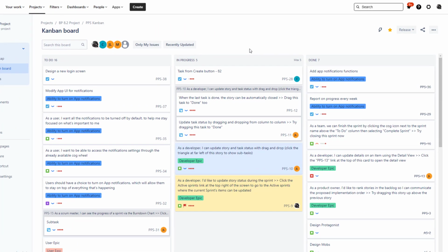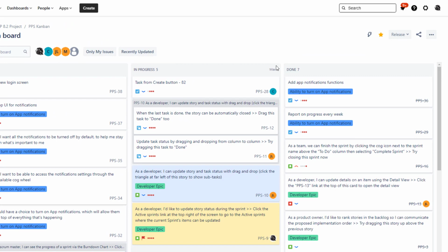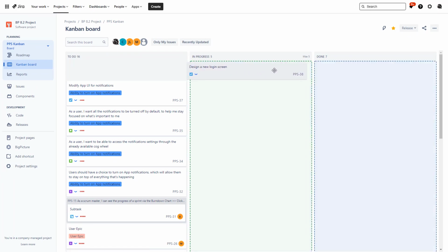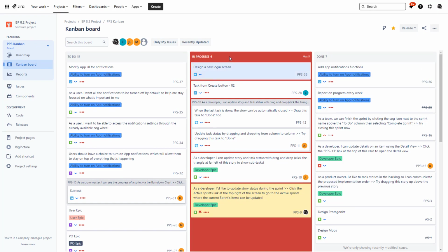When needed, you can define a maximum number of issues in each column. If it's configured, in our case to a maximum of 5 issues, and the number of issues in that column exceeds the limit, that column will be marked in red. This is the easiest way to spot bottlenecks. Finding them quickly allows you to identify and resolve the root problem before it grows.